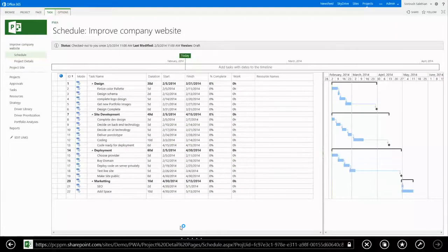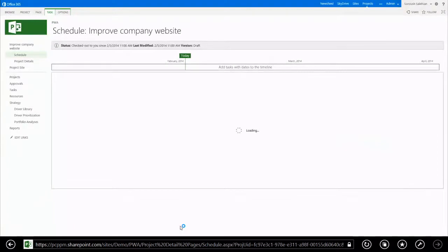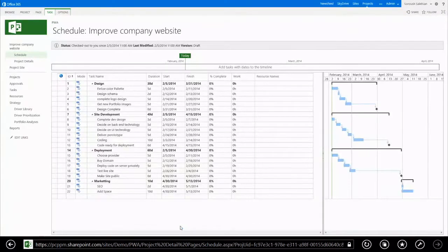So the nice thing is that the scheduling engine in the back keeps the state of your project. So yeah, if you move around, like the case that I did right now, where I moved from browser to browser, as long as it's your credentials, it knows it's you editing the project. So you can move from machine to machine and pick up where you left off, as long as the process is open.